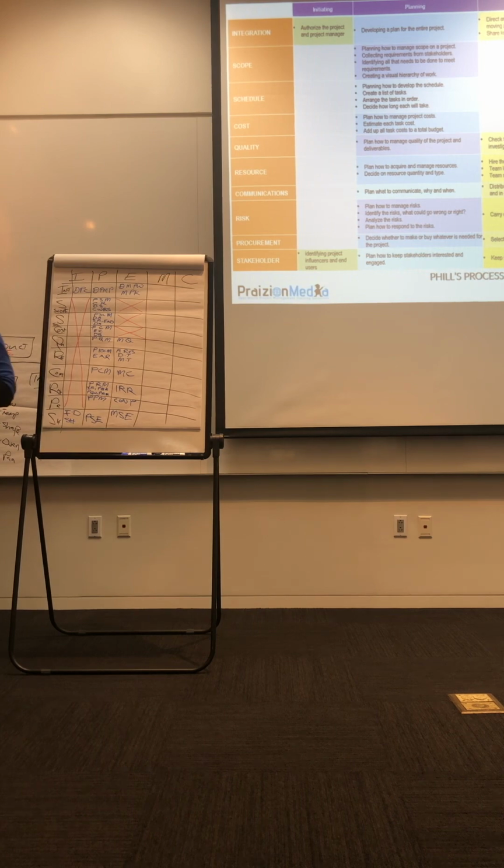Yes, Molly? So on the procurement stage, I know you said blind, but I know for a fact I have a couple of vendors that I have a real good working relationship with. I prefer not to be blind in that process because their level of quality and feedback is, you know, I couldn't get some of my projects done on time or handle problems without that level. Gotcha. Absolutely. So there's a place. A lot of the blind bidding is for certain project types. But if you've got a vendor that is killing it, and you want to engage that vendor again, absolutely. Then don't make it a blind bid. That wouldn't make sense. But it has its place.